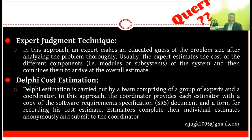The total number of experts chosen depends on their availability and the size of the project. The second category is heuristic techniques. This technique basically uses the concept of learning from previous projects to estimate the cost, although intuitively very similar to expertise-based techniques. Heuristic estimation techniques take a different angle — the objective is to find a similar system produced earlier and determine how the properties of the new system vary from the existing one.